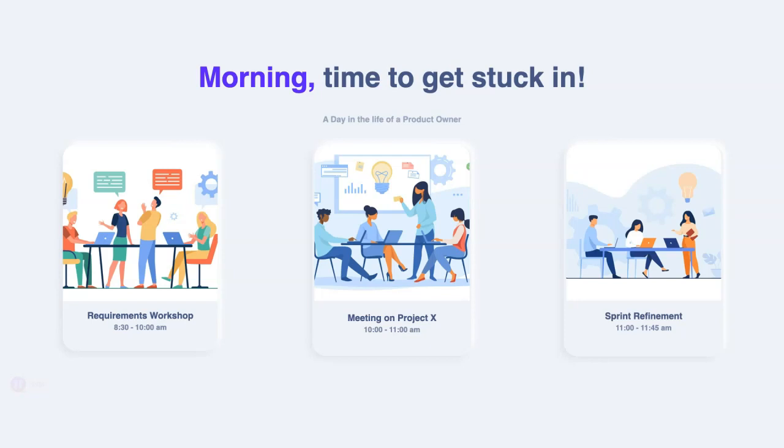I've already prepared these requirements. I've got them on the backlog. I feel like I've written great requirements and great acceptance criteria. But as these sessions should go, the developers, the rest of the Scrum team, they ask really good questions from their perspectives about the acceptance criteria and the requirements, ensuring we've got full alignment and understanding. This is going really well, and actually we move on to then estimating those tickets. We add some story points to it, and we've got a couple of tickets ready for sprint planning. So pretty successful meeting.